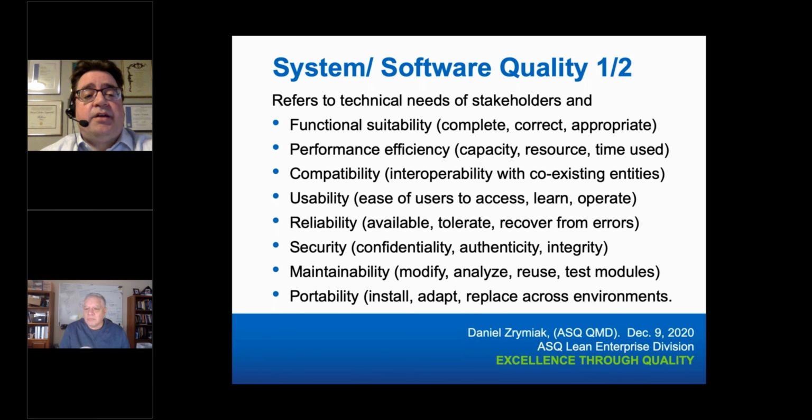I've reverted back to slide 22, which shows some of the categories. So I think first of all, it's very important to acquire a version of this, which details some of these out, and incorporate that into your verification and validation plan. In terms of the software itself, whether you are developing it or getting it from a third party, having clear requirements of what you need is important to understand. What does quality mean? So use this to define your acceptance criteria, and then once you have your acceptance criteria, evaluate the software performance relative to that.